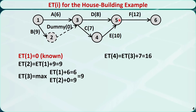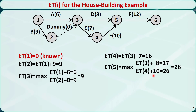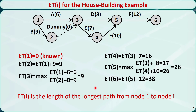For node 5, the early time has two options: the early time of node 3 plus the duration of activity D equals 17, and the early time of node 4 plus the duration of activity E equals 26. We pick the larger value, 26, as the early time for node 5. For node 6, the early time equals the early time of node 5 plus the duration of activity F, which is 38. As a general rule, we can think of the early time of node i as the length of the longest path in the project network from node 1 to node i. For example, from node 1 to node 3, the longest path is 1→2→3 with length 9. From node 1 to node 5, the longest path is 1→2→3→4→5 with length 26.